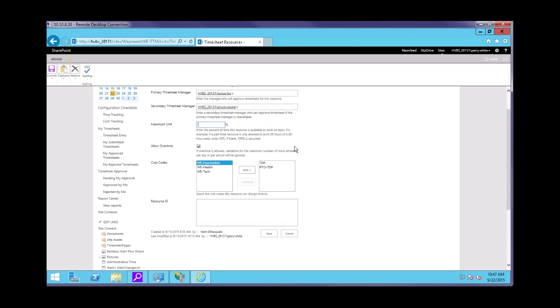This is just so you all don't have to micromanage your employees or watch over them when it comes to inputting their time. The tool will do that for you. And then we have a checkbox that will allow overtime or not. If it allows overtime, it'll just work as it does, and you can input as many hours as you like. If you disallow overtime, then it comes back to our work validation hours that I showed you earlier, where you can either validate by number of hours they can work in a day or the number of hours they can work in a week. Once they reach that limit, they'll no longer be able to access and input more time for that week.